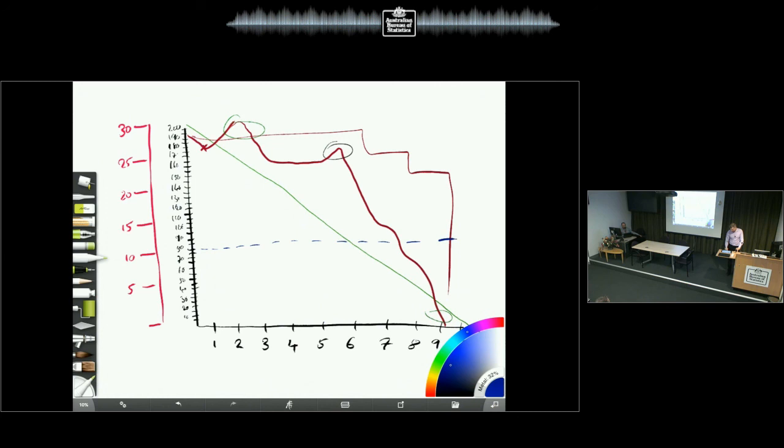Now, you can capture this in Jira, or if you've got a co-located team and you're just using whiteboards, you can just on the daily stand-up say how many hours yesterday, 2, 3, 5, that's another 9. And you can see this trending up like this. So that's unplanned work. If you've got this happening, you know early on that you've got a problem.